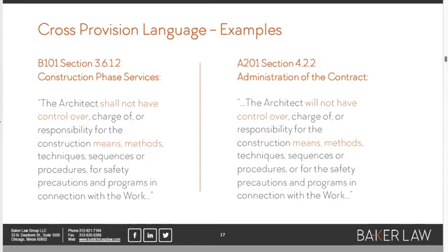Because even if you never negotiated one, even if there's not one associated with the project, if you use the B101, it automatically defaults into the standard off-the-shelf A201. Right? The A201 is not a document that requires a signature. It's technically not part of the architect's agreement, although it very much binds the architect for reasons that we will discuss. But the B101 points to the A201 general conditions. It incorporates it by reference, okay?